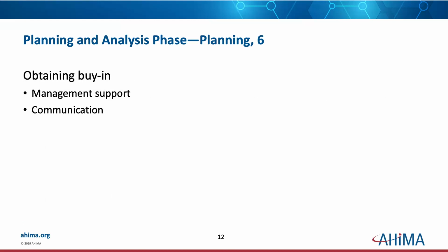Obtaining buy-in. You have to have buy-in or your project will fail. I have worked at organizations that have failed to do this, and I cannot tell you how they could have saved themselves so much time, effort, anguish, sabotage, all sorts of other things had they gotten buy-in in the planning and analysis phase. If you wait to talk to providers at the point where you're getting ready to implement training, you can write it off. It's not going to work. These are people who use the system every day, and they're using it to care for their patients. You've got to get their buy-in.